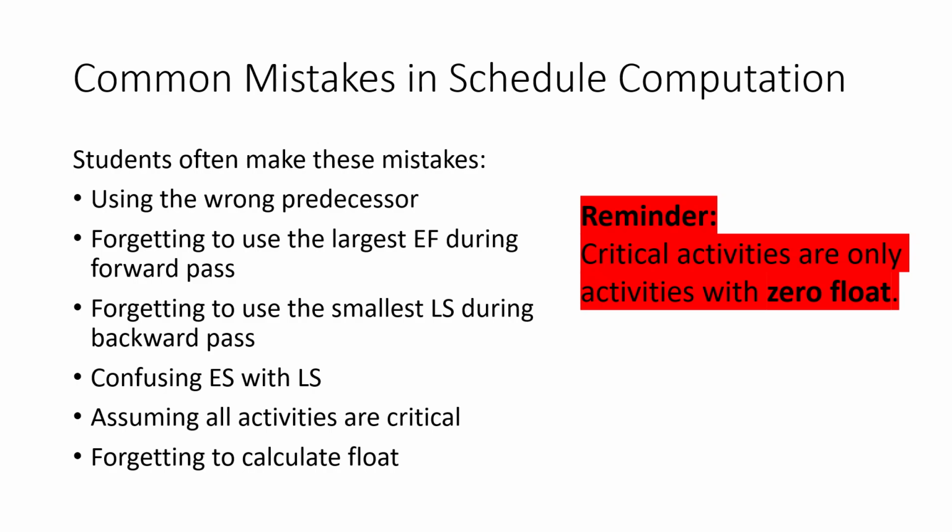Another mistake is confusing ES with LS. ES is the earliest start while LS is the latest start. Some students assume that all activities are critical. This is not correct. Only activities with 0 float are critical. Finally, some students forget to calculate float. Without float, we cannot identify the critical path accurately.